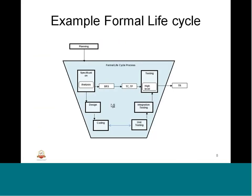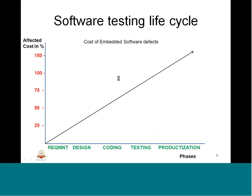We need to have testing identified for each stage because it is very important to identify software issues or bugs at that stage, so that the cost of maintenance or updates of the products will be less. As we identify issues at initial stages, the cost is lower. As we go deep into productization, the cost grows up — we cannot afford to have a bug in the released product because the cost will be very high, going through several life cycles. A requirement could be wrong or something like that, so we fix bugs at the stages as early as possible before we release the product — that is the story of this slide.